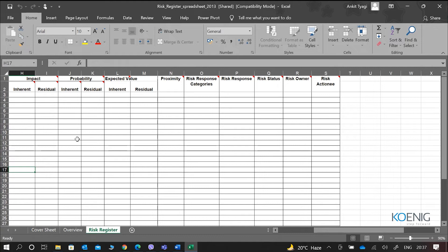Then there are the risk response categories — whatever categories we have: avoid, mitigate, transfer, accept — those are for the negative risks. Out of those categories, whichever one has been selected is defined in the risk response. The risk status indicates whether the risk is still to happen, has become obsolete, or is in progress. The risk owner is someone who has the overall responsibility for the risk, ensuring it has been assessed properly and that response plans are available and can be implemented.